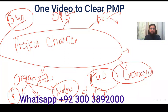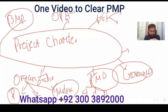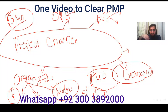To summarize the flow: a need occurs → need assessment → multiple options evaluated → business case created → benefit management plan made → organization environment assessed (EEF, OPA) → organization type identified (projectized, matrix, or functional) → governance and PMO level determined (supportive, controlling, or directive; unless mentioned, always assume PMO is supportive) → project charter created. The project charter is a formal document that authorizes the project manager.